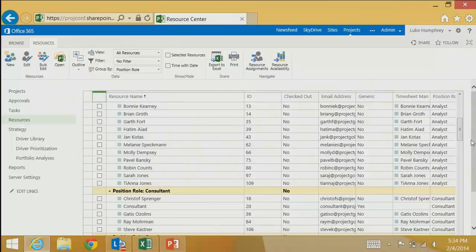I have been asked many times, think of role as a primary skill set. So every resource has a primary skill set. What do you want to use that resource for? That's how it rolls up into the capacity. It needs to be only one skill set. That's how the tool has been set up to work. So you've got to figure out what is the best use of that resource. It kind of eliminates a resource saying, yeah, I can do SharePoint too, but my primary skill set is Project Server. That will eliminate that kind of confusion about which is the primary skill set.